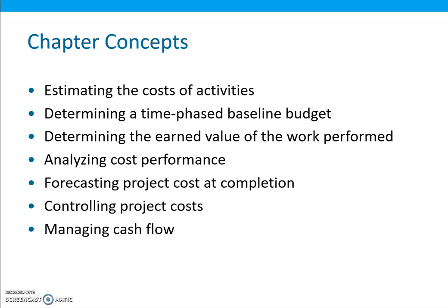And number three, cumulative budgeted amount planned to be spent based on the project schedule from the start of the project. Then comparisons must be made among these three parameters to evaluate whether the project is being accomplished within budget and whether the earned value of the work performed is in line with the actual cost expended.